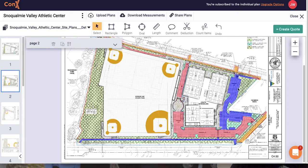And then location number 5 is the pedestrian path that you see up here at the top on Bulch, and then down below, all down across Bendigo Boulevard. That's your 2 inches of asphalt on the pedestrian path, and then in the parking lot, you've got the 3 inches of asphalt. Again, we excluded all grading, all crushed rock. That would be something set and compacted by probably the dirt work company. Okay, so those are all the areas of asphalt that are included in that bid price.